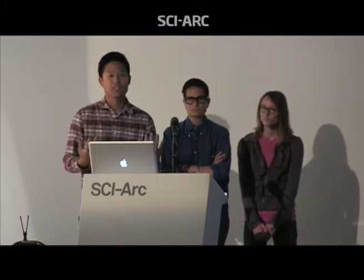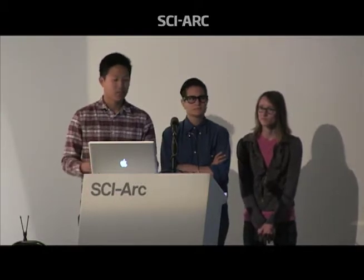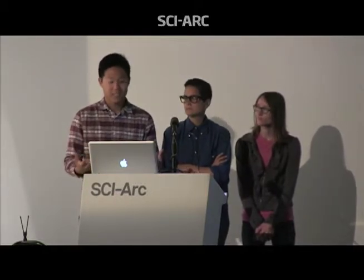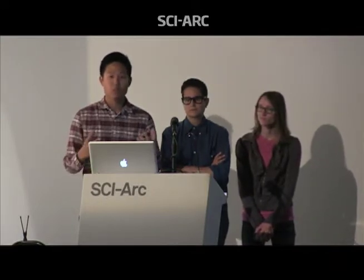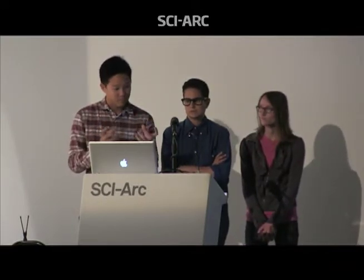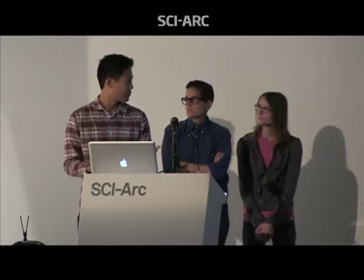But then we realized, oh my God, we're going to fail this affordability. We're going to get like 0 points. We have to do something about it. We have to go back to the drawing board and design a house for 2 modules, essentially cutting off 1/3 of the price. So stuff like that is a very real problem that emerges that we have to deal with, because we don't want to fail.